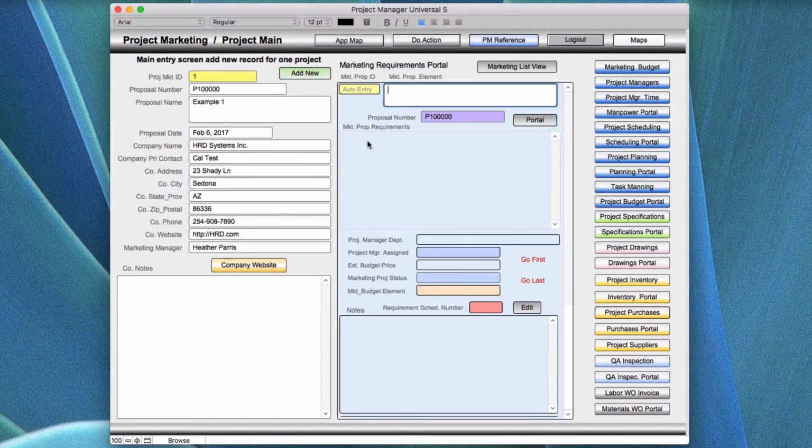So what we would do then is we'd write in the proposal information after we titled it. We'd come down after it's all for that 4.0 thing we're doing in the civil part. We would put all of our data in this field for that particular portion. You would not try to put the entire proposal element in one breakdown. It would all be for like 4.0, 4.1, 2, 3, and so forth. You can even do a 4.1.1 if you needed to. It's up to you how you do your work breakdown structure.